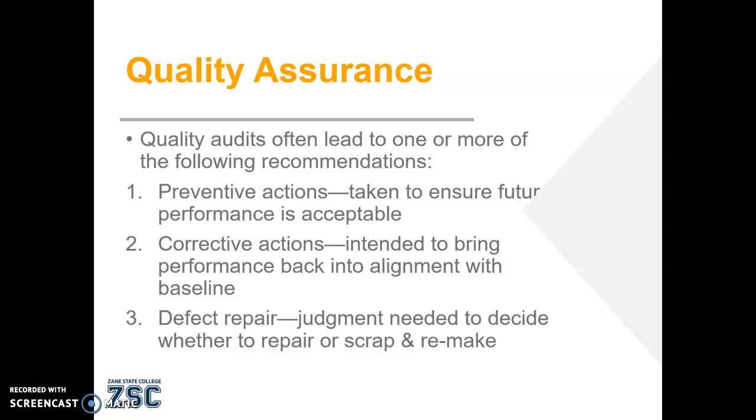Specifically, preventative actions, things that can be done to make sure that future performance is meeting the agreed upon criteria. Corrective actions are intended to correct or fix or bring certain performances up to the standards that they should be at. And defect repair, which is whether or not something should be repaired or just simply abandoned.